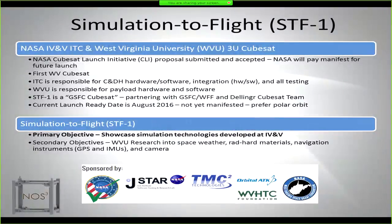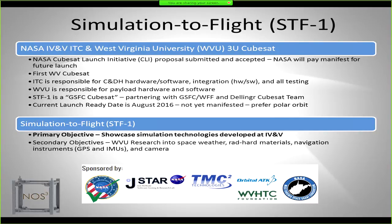We have a CubeSat mission called Simulation to Flight 1, STF-1. It is a collaboration between NASA IV&V and West Virginia University in Morgantown, West Virginia. This is going to be a 3U CubeSat. About a year ago we submitted a proposal to the NASA CubeSat Launch Initiative and were accepted — NASA will fund the manifest and launch of our CubeSat. It will be the first West Virginia CubeSat. ITC is responsible for the C&DH side, including hardware and software integration and all testing, while West Virginia University is responsible for the payload hardware and software — they do the science, we do the C&DH.